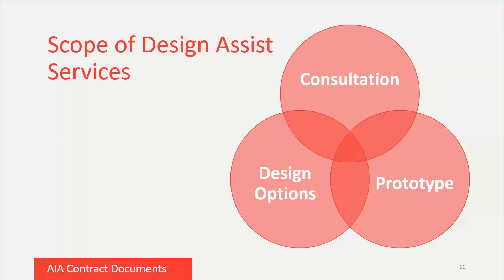In our hypothetical, the consultant is going to provide three types of design assist services. First, it will consult with the owner, design team, and CM to understand the concept and aesthetics of what the owner wants in a facade. Then, once it has that information, it will prepare two or three different design options for the team to choose from, with follow-up consultation and meetings. Finally, once the owner chooses its preferred option, the consultant will do spatial coordination, 3D modeling, and prepare a full-scale prototype, which will help the CM and design team understand how the facade will work in the field and ensure coordination among trades.